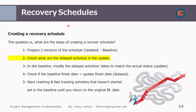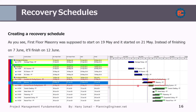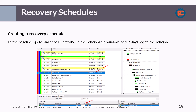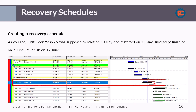I prefer to have a recovery schedule without updates. What I'm trying to do is to bring the planned date as near as the updated version. So we check the delayed activities in the updated schedule and modify the delayed activity dates to match the actual status in the baseline version. For example, if we have a delayed activity, we go back to the baseline and fix this activity so it completes on the forecast finish date shown in the updated schedule. Then we go to the successor activity and add a two-day lag to the relationship, pushing it two days because in the updated schedule it was delayed two days.